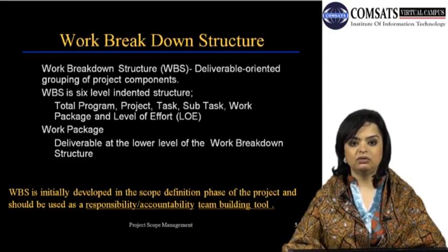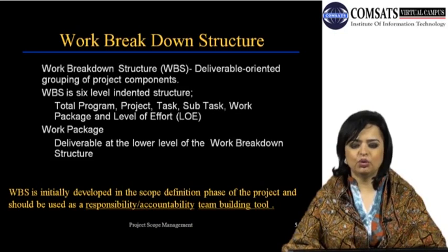The best way for creation of a WBS is to get the team together, whoever is part of that project team at that point in time. Get them in a room and start with a whiteboard, a clean board, and start listing activities.